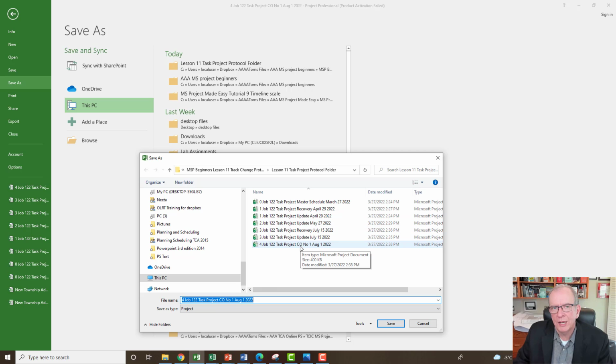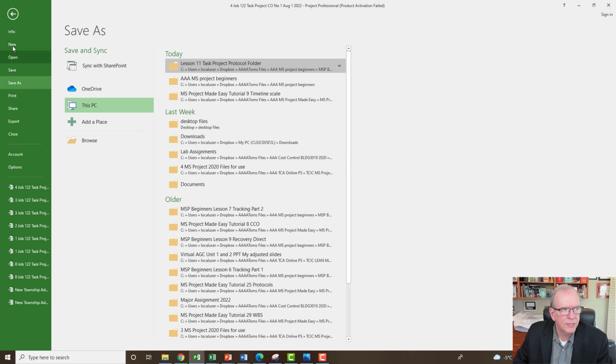So maybe you're just checking so that you can price it, and then you can also take screenshots to justify the impacts on the schedule and the cost of the change. The better you sell and negotiate this, the better it is overall. But you see how it's nicely organized. And it's not a big deal once you get into the flow of it to change the names, etc. That's why I like that sort of process there.